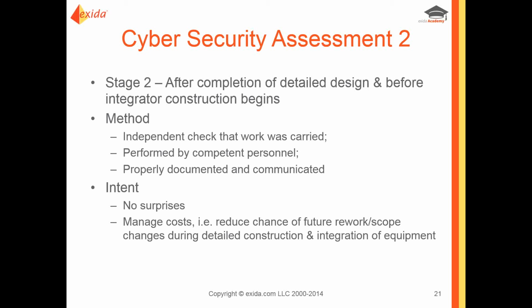The whole key here is you do not want surprises. The real reason for doing this is to manage cost. You do not want future rework. The worst thing to do is to let the contract to the fabricator, and a month after they've started, you go through and you do this security assessment, you find a lot of problems, and now you're into scope changes with the fabricator, and that adds cost to your project. So that's what you're really trying to avoid.